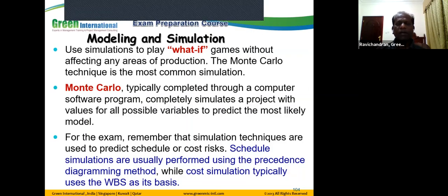And in this combination of risk conditions, what should be the critical path you should follow? It will show you all the critical path activities you need to manage in this risk condition. And then it also will tell you what is the risk rating of the project, meaning whether it is a low risk project or medium risk project or high risk project. It can be able to tell you through the Monte Carlo simulation.